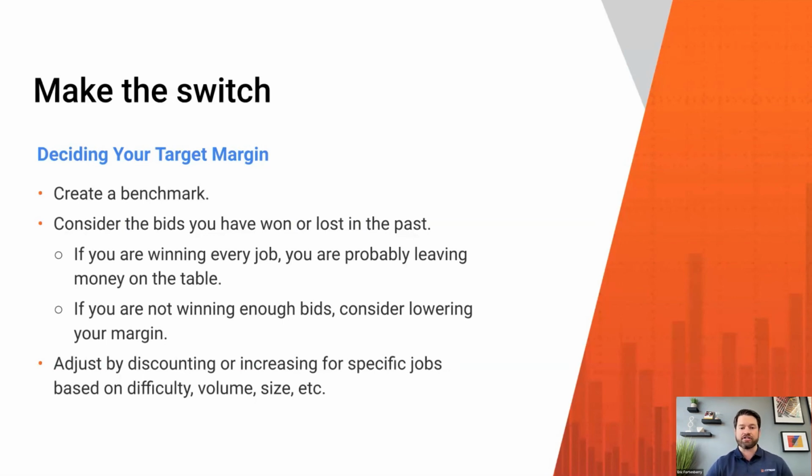The size of the job obviously is number one, but also, again, the difficulty of the job. If your risk factor is increased, then you need to account for that. And you should be targeting a higher profit margin so that, if the worst case scenario happens, you're still not underwater. You're still making money on this job and it's still worth your time. Otherwise, what's the point?